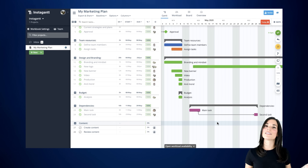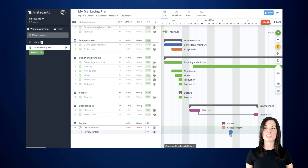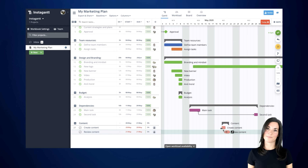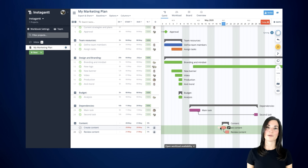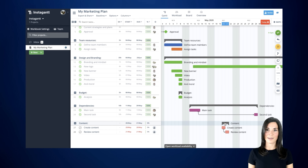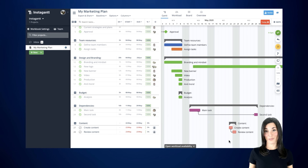Let's say your first task starts and finishes on May 20th, and your dependent task is meant to start on May 21st, just after the main one is completed. But a delay occurred and the first task was not completed until May 22nd. Simply drag the finish date of your main task across the chart, and you'll notice how your linked tasks will move to May 23rd. Pretty useful, right?